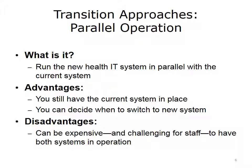A second transition approach is parallel operation. With a parallel strategy, you introduce the new system without taking the old system out of service. In this way, you can decide if and when the new system is operating effectively. Can the new system handle the volume? Can it handle the response time requirements? Does all the intended functionality work as intended? By having the current system still running, it is easier to compare the deliverables and performance of the new system side by side with the current system. Then you can turn off or wind down the current system, leaving only the new system to operate. One major source of transition risk is mitigated because the new system will be running in the true operational environment.